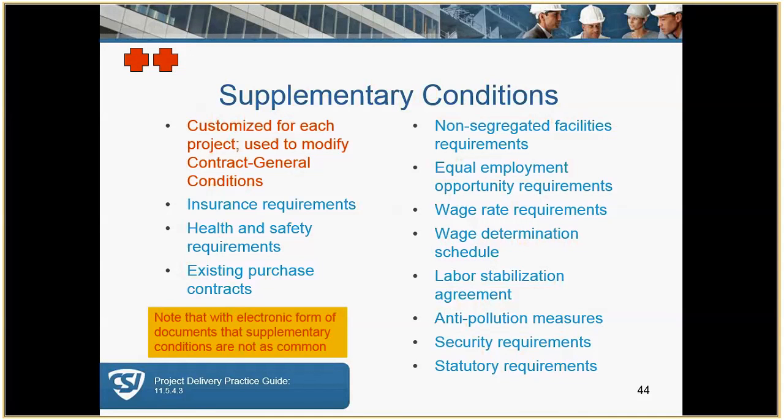Because of the fact that there are standard general conditions, keep this in mind. If you know the A201, everybody knows what an A201 includes. If you're a decent sized contractor, you can simply reference it instead of include it. But you also need to make some changes to it. Okay.